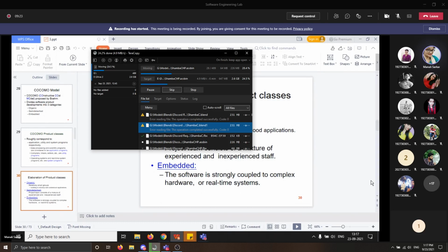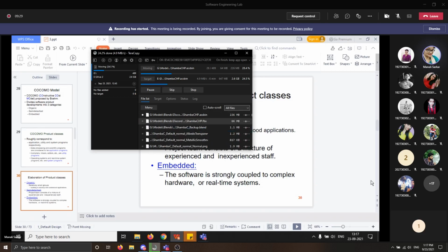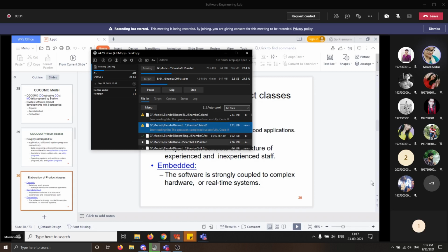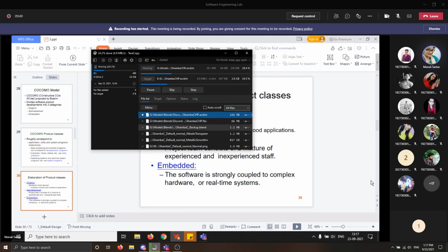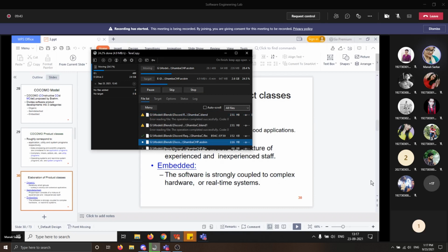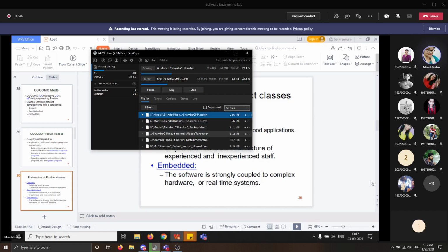So Boehm, in addition to considering the characteristics of the product being developed, considers the characteristics of the team members in deciding the category of the development project. Thus, a simple data processing program may be classified as semi-detached if the team members are inexperienced in the development of similar products. For the three product categories, Boehm provides different sets of expressions to give the effort and development time from the size estimation given in KLOC.